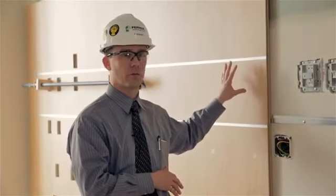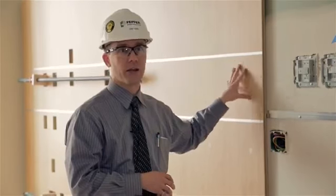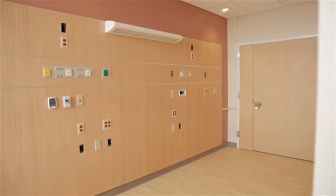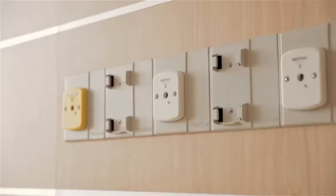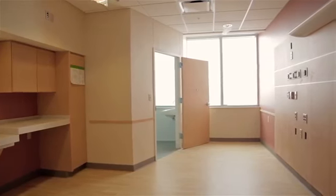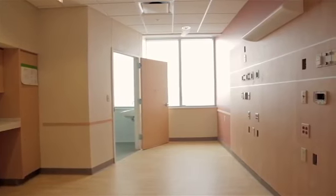The install of this goes much faster, it's much more precise, and takes less man hours to get this done than the old-fashioned way. By noon the first day, we had probably 10 head walls set, and that is something that would be easily a couple of weeks of wall rough-in in the field, so that had all been taken care of, and that helps us accelerate the schedule inside. There's about 2 months of rough-in time that we essentially displaced and did early, so that, for all intents and purposes, shortens that construction schedule by about 2 months.